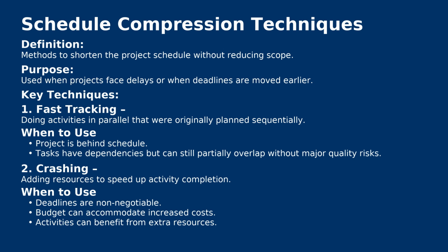Increased chance of rework is one of the risks for this technique, and there could be potential quality issues if dependencies are not fully met. Let's take an example of a construction project where you want to start interior design work before all structural inspections are fully complete. In case of a software development project, you would like to begin system testing while some development modules are still being coded. In case of event planning, you may like to design the event marketing materials before finalizing the guest list, because both of these activities are independent and they can be executed parallelly.